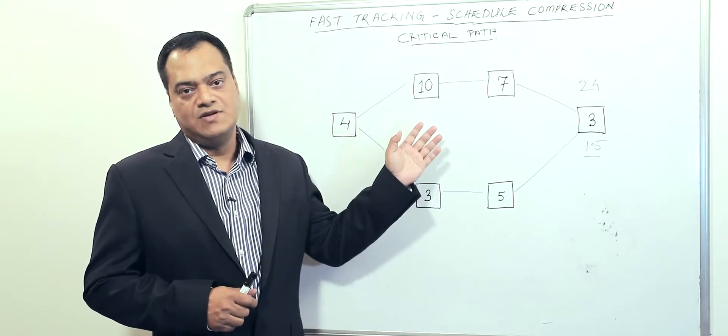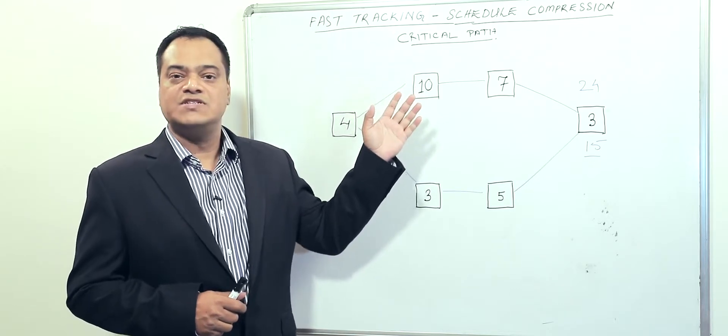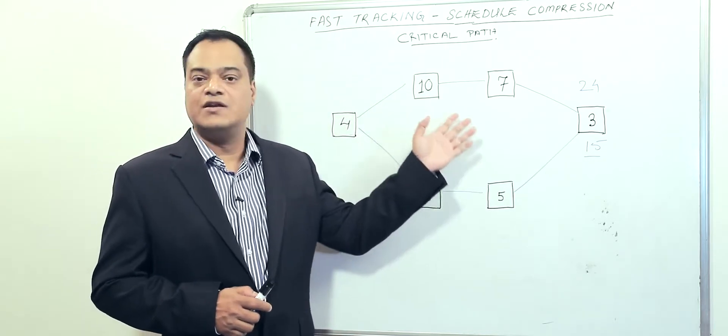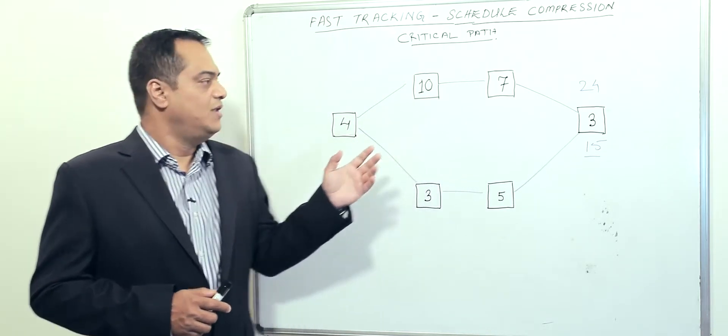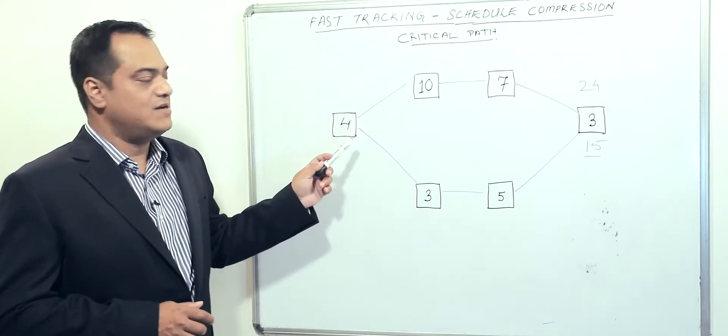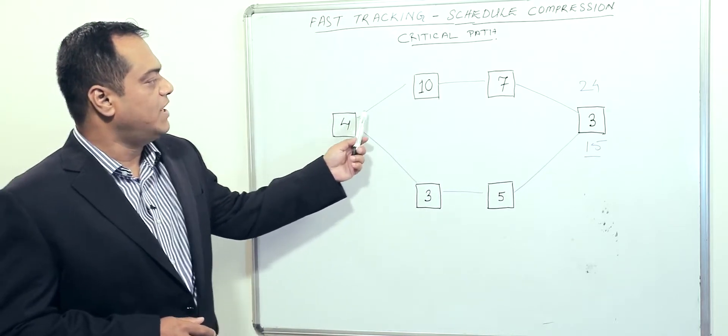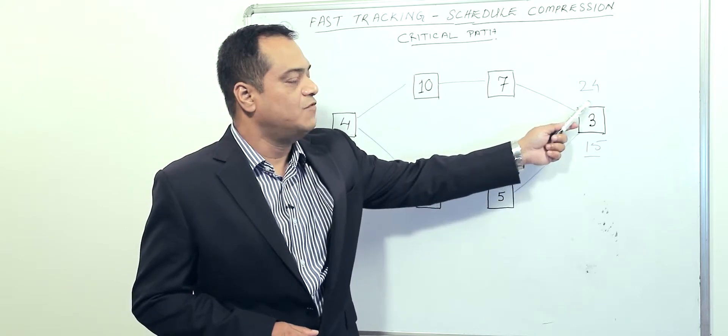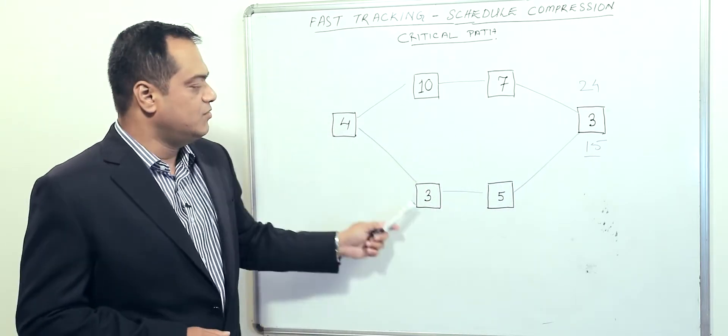We're working on a network diagram, and schedule compression normally happens with the critical path. In this example, we have one path that comes up to 24 days or weeks and another one that comes to 15.